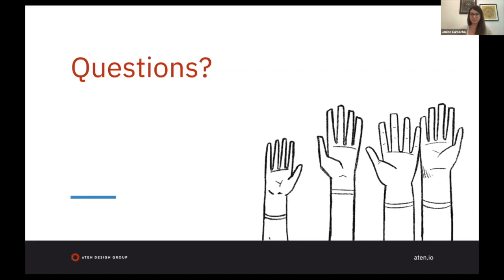Awesome. Okay, great. This is all great. I want to do a callback to what Sally mentioned earlier with the stakeholder survey, which is pay attention to who's responding and who's taking a long time to respond. Because if you do a stakeholder survey at the beginning of the engagement, you'll find the people who are either frazzled or just disinterested, and the people that you're going to have to chase down on the project. It's just another way of getting ahead of missing a toll gate and getting feedback.